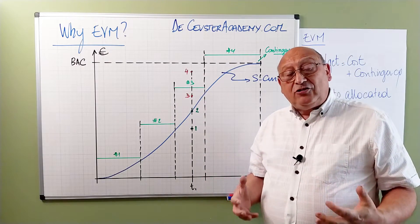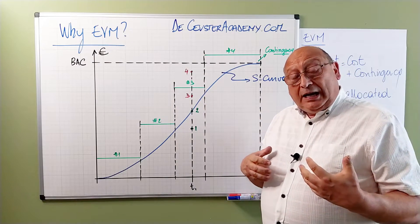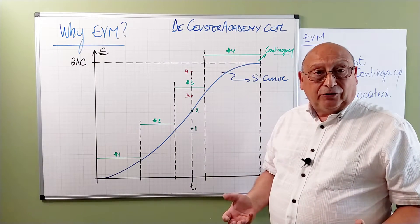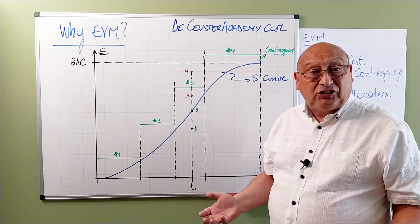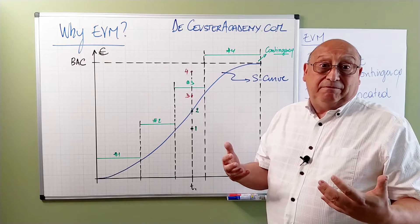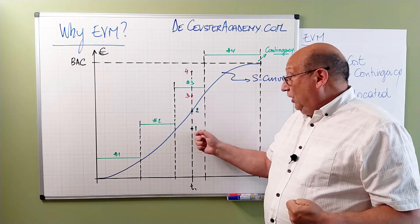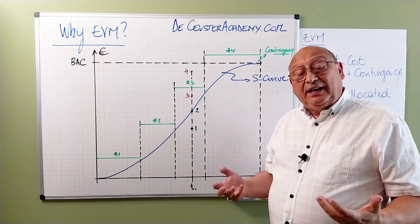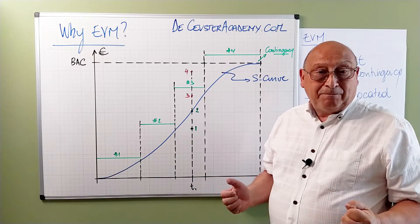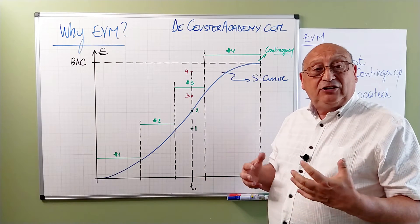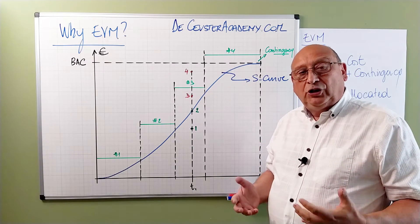Now just with this information we cannot interpret exactly what it means. Is point one good? Is point two good? Imagine that you're performing better - you're making more deliverables. Then the S-curve will move to the left, it will be steeper, and we will be spending money faster. That's positive, but budget-wise we see this as negative because I'm spending more money than I planned. On the other hand, for point one, it may be that we are spending less money because we are having delays. Just with this information, it's not possible to understand these things, and that's why project managers have introduced the concept of Earned Value Management.